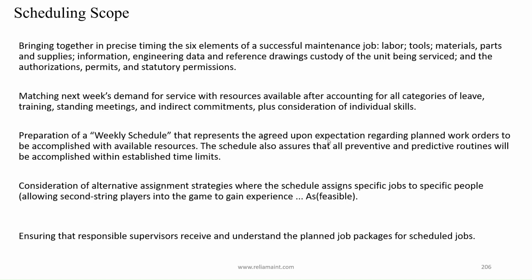Matching next week's demand for service with resources available after accounting for all categories of leave, training, standing meetings, and indirect commitments, plus consideration of individual skills. Preparation of a weekly schedule that represents the agreed upon expectation regarding planned work orders to be accomplished with available resources.